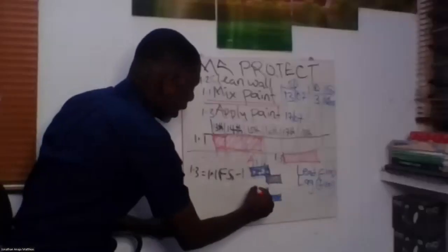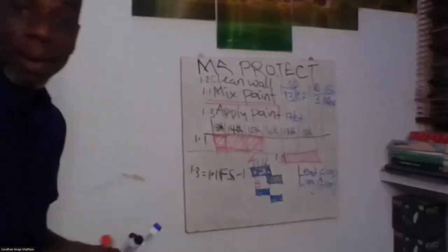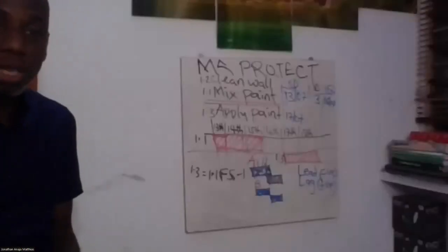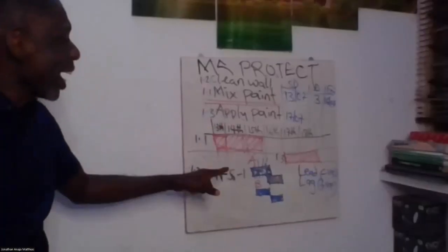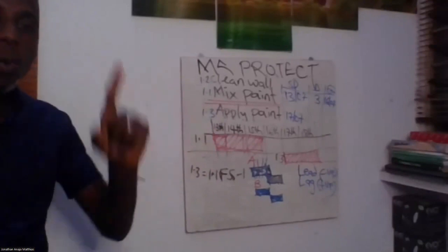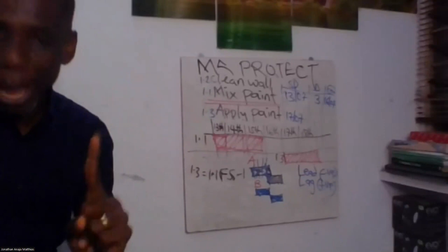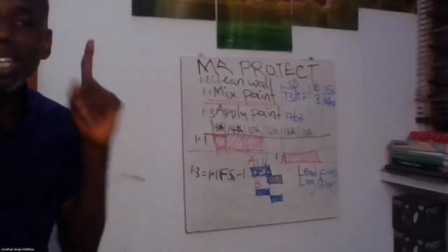Good. So if I name this A, I name this B. Even though they don't look alike, they have the same relationship. What is the relationship? Finish to start. But the difference between A and B is that A is finish to start with 1 day lead time, while B is finish to start with 0 lead.